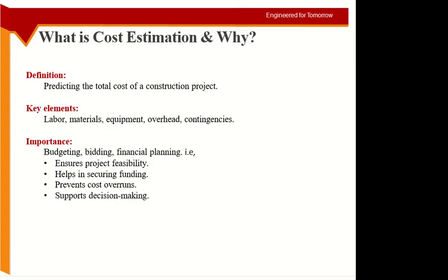Okay, I already mentioned about securing the funding. So once you know the cost, I need this much money. Then it helps you with the tracking as well. You already have a target in your mind. Okay, so you assign this much cost to the project. Okay, when this project finishes, I will need this much money. Okay, so if I'm going over this money, that means something is going wrong, something is not going according to the plan. So a cost estimate helps you with the tracking of the project as well.